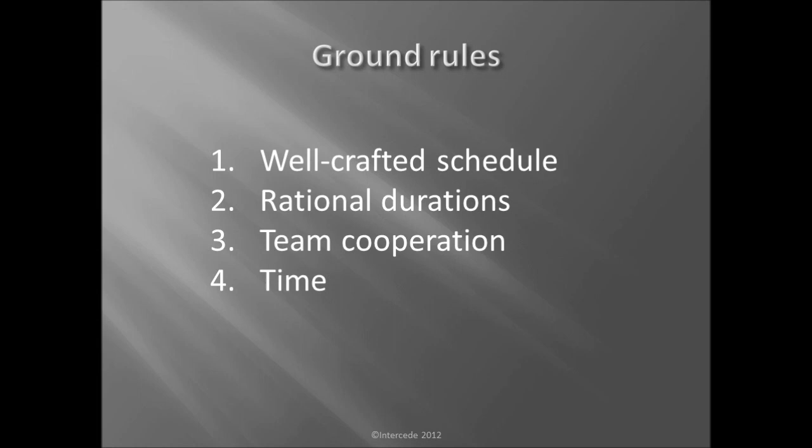Another point here is that the durations are determined rationally, and that means that they came from some point other than the planner's schedule. That we can point to how they were developed, and that it is a resource loaded schedule so that we have crew sizes against these durations.